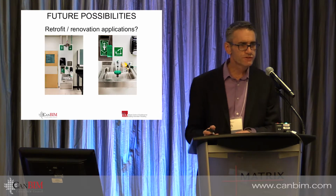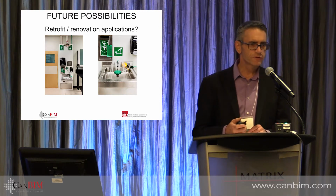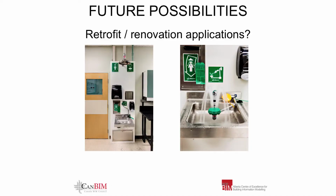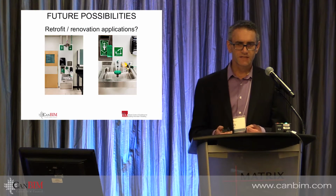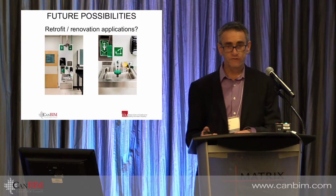It doesn't have to be new build construction. These are units that we built in Toronto and shipped to Calgary for retrofit applications in a lab building. They went in extremely quickly. In an operating lab building, it took the install time down from 4 weeks to 4 days by building all of the stuff off-site.